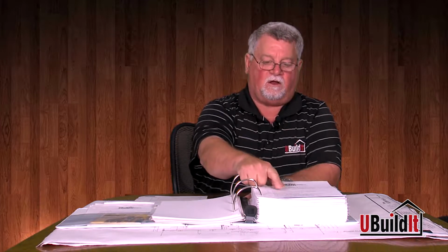The electric co-op says set up an account with electric company. I call that contract for service. After your temporary pole is set, you'll need to contact the electric supplier, the electrical provider, to come out and hook the power up. So for contract for services, they're going to need your billing address where you live now, and they're also going to need the address of the job site so they know where to come and set the meter.